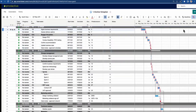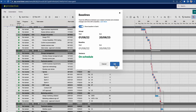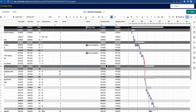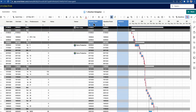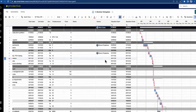Once you've agreed, you can now baseline the project. For example, once 'scope and charter agreed' is done, I would then set the baseline on the project — press the button, 'show the baseline in Gantt.' It says: the dates in your plan are the baseline — we'll remember that, and any variance against that we'll show you. Baseline columns are then added: baseline start, baseline finish, and variance.